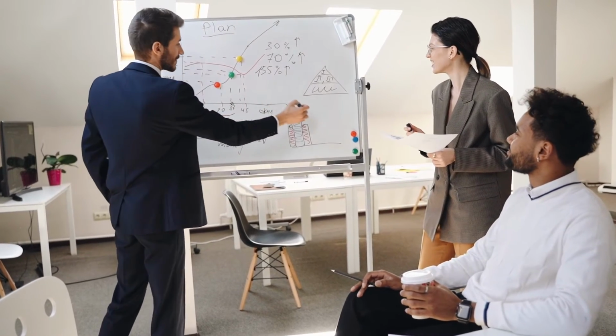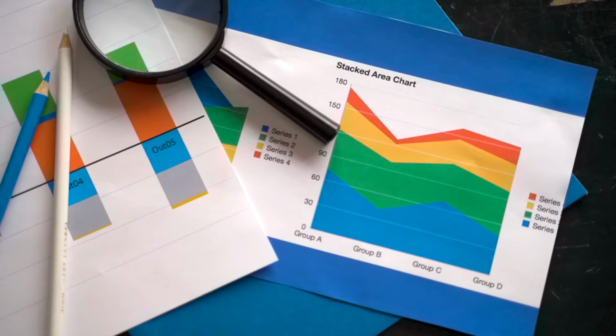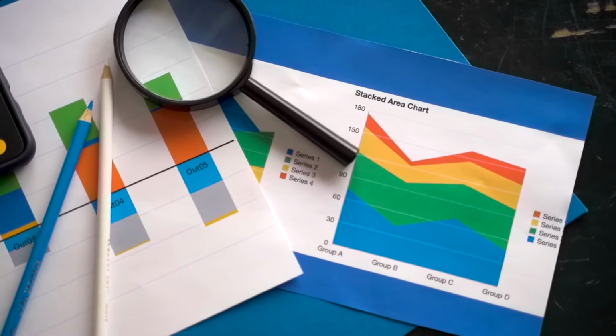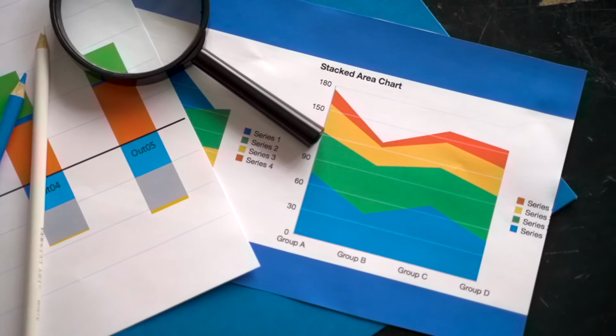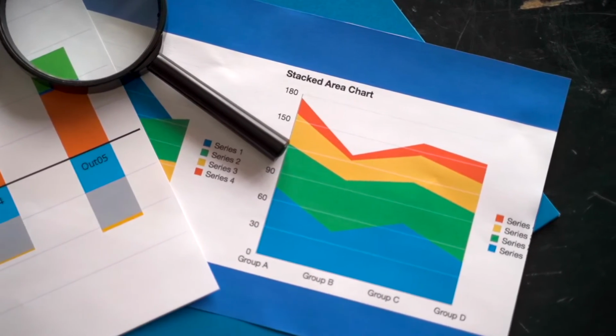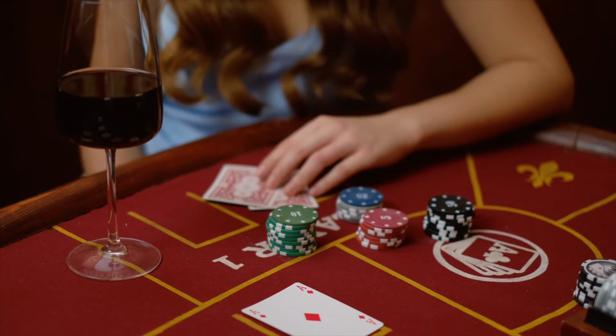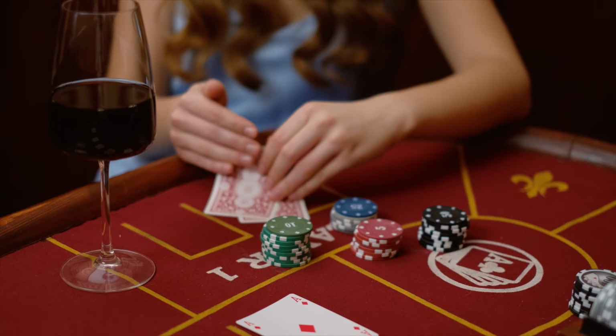Next step is involved with extracting key metrics. From the simulation results, project managers can extract key metrics such as the most likely completion date, the probability of finishing the project by a certain date, and the range of potential costs. This information helps in making informed decisions and managing expectations.